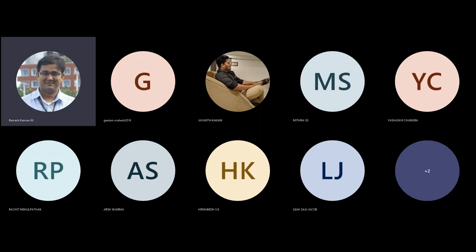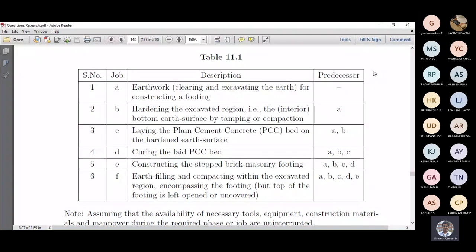Digital assignment number two is on critical path method. For that, you need to have the activities followed by predecessors, immediate predecessors, and successors, and immediate successors. Generally, we'll prefer activity on arrow, not activity on node. We only prefer activity on arrow, so you need node links also or event links.